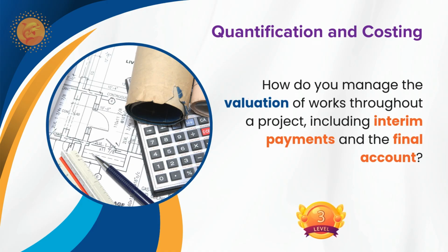Yeah. So you have to be careful that what you are giving is in line with your project form of contract. That is also important. Again, valuing on-site, off-site materials as per your contract, and any other things like claims, EOT, whichever is there, that you also have to take and record in your payment.